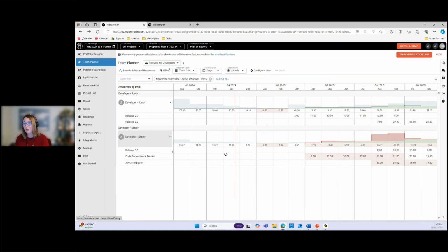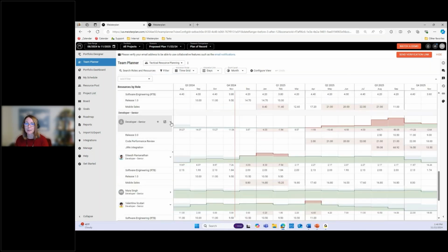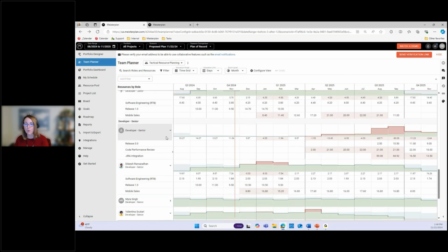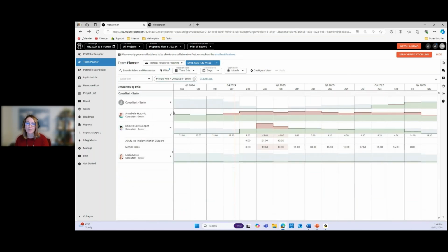So look at this view. It's ideal to kind of name that resource maybe 1 quarter out. If you're having planning intervals, that would be the time to think of getting that done, while you can see future forecast always at this role level. The other view that would be helpful, I'm calling it tactical resource planning. It's a view of the people. While I'm viewing the people, I want to be able to make sure I'm seeing if there's any issues coming up. I'm able to look at what's on their plate.